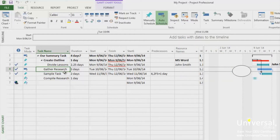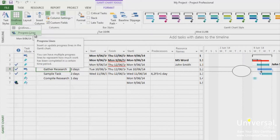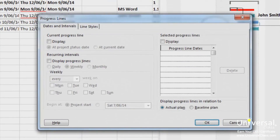In addition, you can add a progress line. This is a drawing tool located under the Format tab in the Gantt Chart view. Just go to the Format tab and under the Grid Lines drop-down, click on Progress Lines. You will then see a dialogue box. Progress lines will show the tasks that are ahead or behind schedule by displaying a vertical line that connects tasks that are in progress.